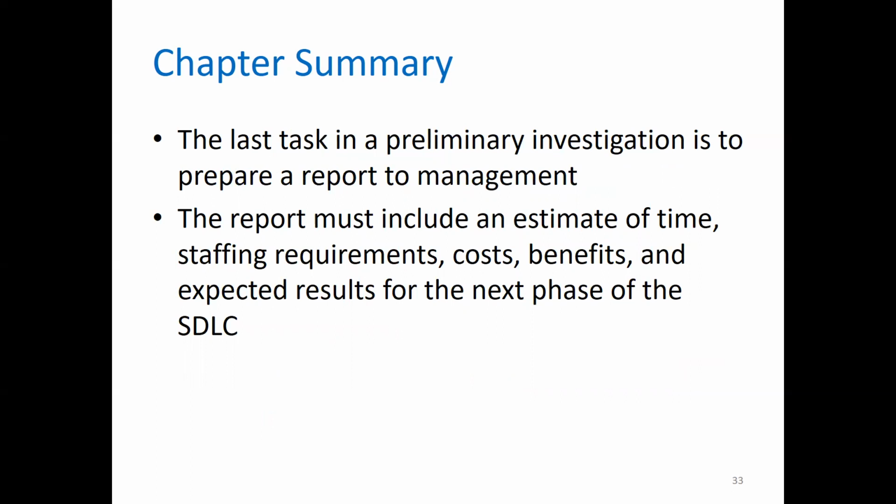The last task in a preliminary investigation is to prepare a report to the management. The report must include an estimate of time, staffing requirements, costs, benefits, and expected results for the next phase of the system development lifecycle.